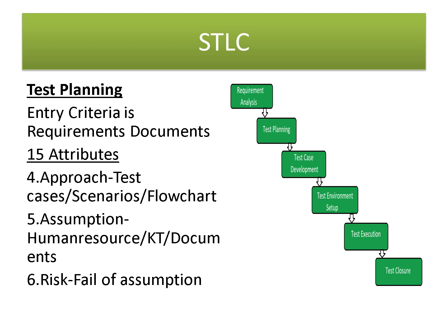Friends, the sixth attribute is risk. If our assumption fails, it is called a risk. If the human resources, like the testers, submit resignation and leave the company, whatever module was assigned to the particular tester will be on hold. This is a risk or a failure of assumptions.